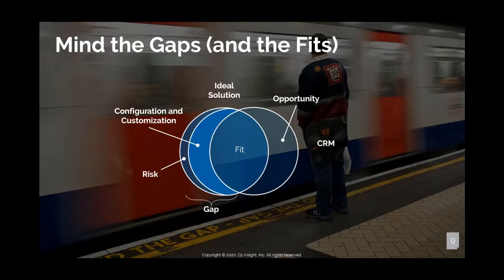At the end of your fit gap, you say, look, here's what we can do. Here's the budget to do this. Does the business buy off on that? Here's the risk. Hopefully the risk is either completely gone, you've covered 100% of the need, or it's a little fingernail shaving, a thin thing where you say, we can live with these few compromises. What a lot of people miss as you put together the business plan for this is that there is also an opportunity. There are things you can't even imagine to ask for that this can do.